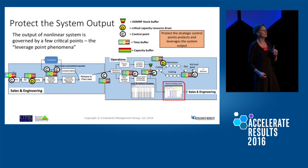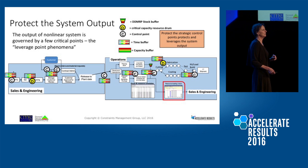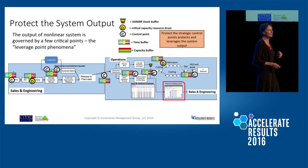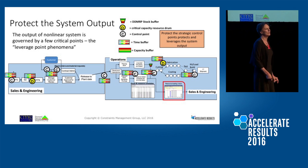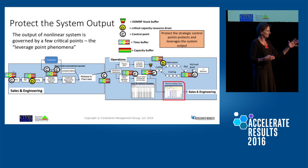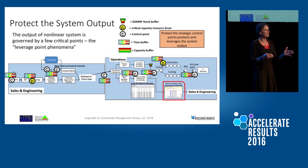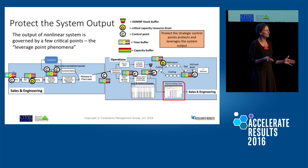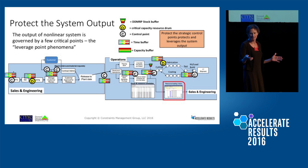Capacity buffers are also critical. A capacity buffer simply says I need sprintability — so when variation happens to me, I can recover. Time buffers and capacity buffers are interconnected. If you have lots of variation, you have a choice: if feeding resources have sprint capability, I need a smaller time buffer. The less sprint capability in a resource, the bigger the time buffer.